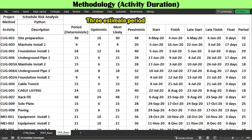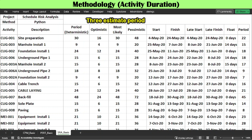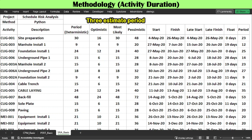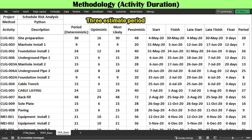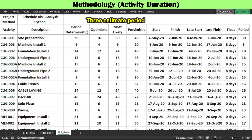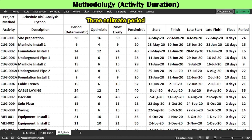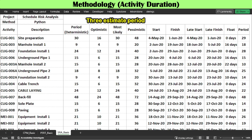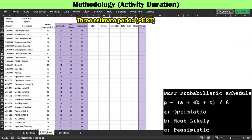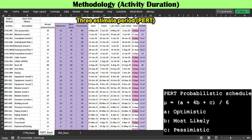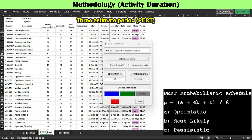Like PERT, schedule risk analysis adopts 3-estimate activity duration for all activities, consisting of optimistic (lower limit), most likely (mode), and pessimistic (upper limit). In PERT, each activity duration is a fixed value — the mean of the distribution — defined as the weighted average of the minimum, most likely, and maximum values, with 4 times the weight applied to the most likely value.